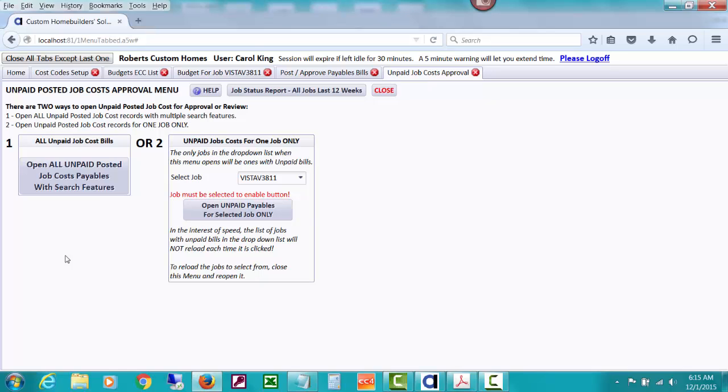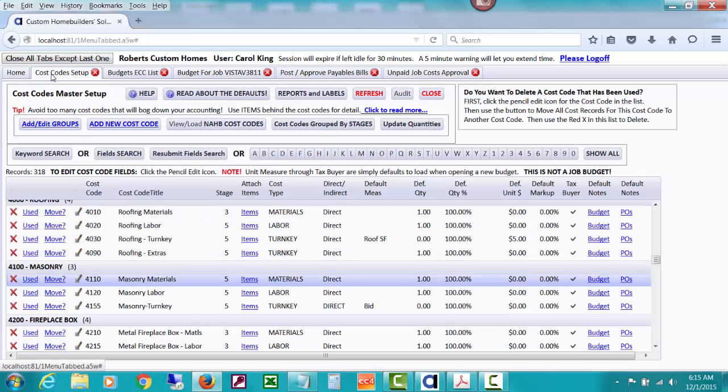Anyway, my point, which I'd like to really emphasize, is that because this builder had that one cost code for masonry materials and not a whole bunch of cost codes for all those types of items, I've seen people set up cost codes for masonry ties and brick and this and that, and I encourage you not to. By simplifying your cost codes, a person can create one purchase order for masonry materials. The person entering the bills can enter one line. If there's sales tax, CHS will post two lines so that you can search for things that are sales tax.